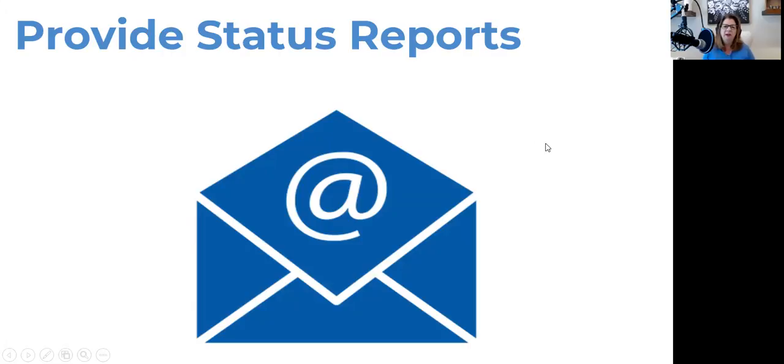Now, you want to provide status reports. You might negotiate that up front. I usually like to ask folks, if I can't get a sense, how do you like to be communicated with? Would you prefer a weekly status report email? Do you want a quarterly status report? We're doing that with one of our large contracts with Positive Impact Consultants, which is my DBA, my doing business as. So we provide quarterly status reports, but I've had clients that really want weekly status reports. It really depends on the types and the amounts of products that you have.